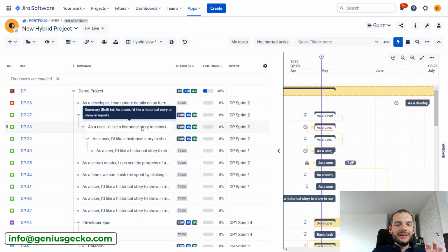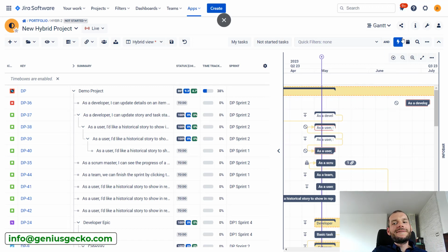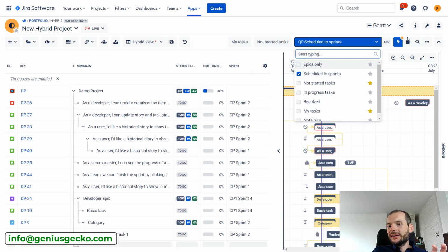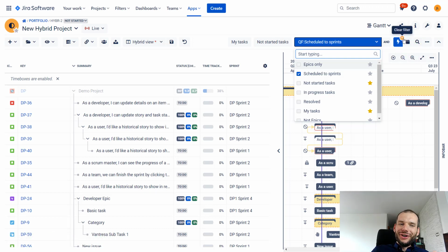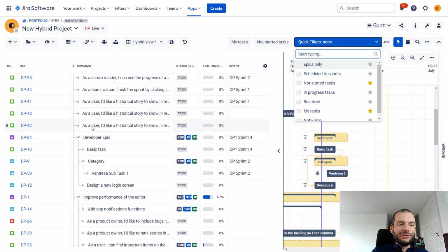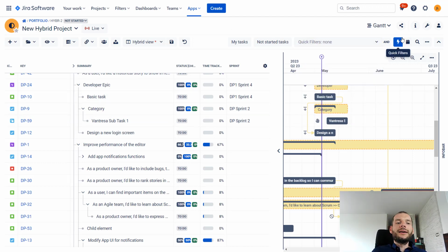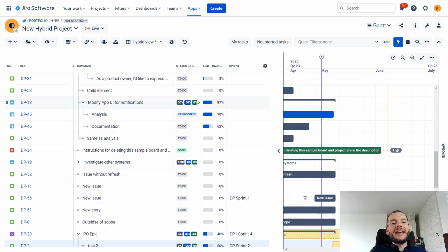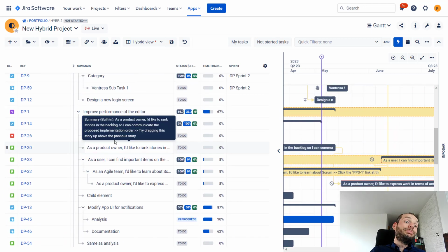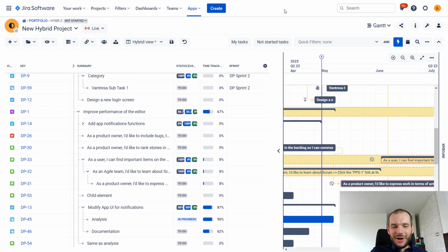Good practice is, if you're entering the module, check if any filter is applied. If it is applied, you will see it as an icon on one of these elements, depending on where it is applied. Very often I've seen situations where someone is looking for a task, they get annoyed because they cannot find it and they are sure it should be here, and it's just that a filter was applied that removed just several tasks, so we weren't able to tell by looking at the hierarchy, but it removed the one that was relevant for us.